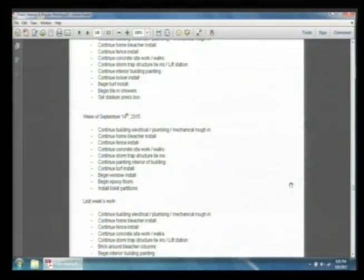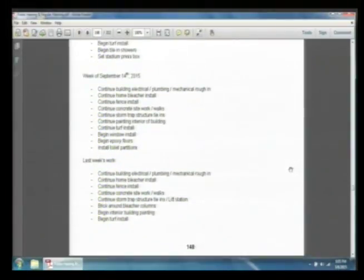We will be set to host the opening on October the 2nd, pending all things going good with Mr. Sindinaki. But October the 2nd will also be the homecoming game, as well as the opening and dedication of the state athletic complex. What will not be complete by October 2nd, the track surface will not be laid, just the base foundation of the asphalt will be laid, and then it takes like 17 to 21 days for it to cure before they put the actual surface on it.